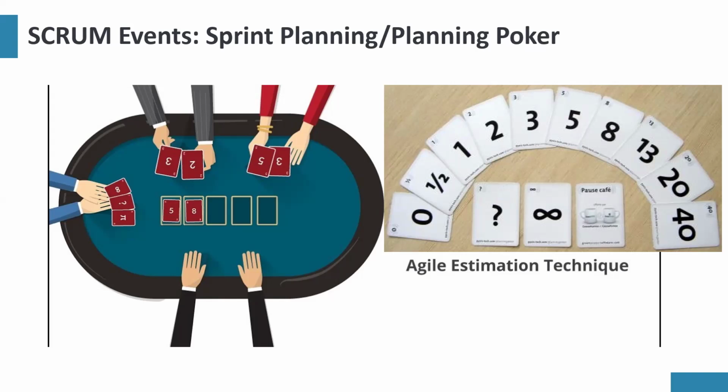What I'm saying is, kilograms is an SI unit, which means 5 kilograms in Nigeria is the same thing as 5 kilograms elsewhere. In story point estimating, 5 story points in this project is different from 5 story points in another project. So why do they use story points? They want to escape time.